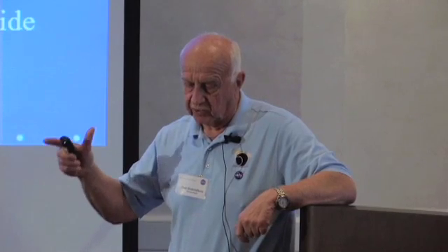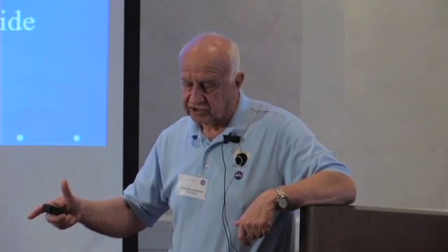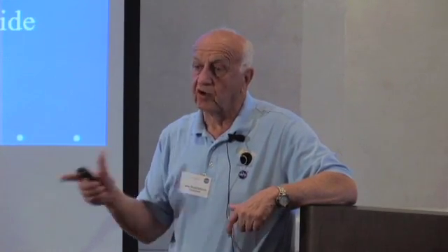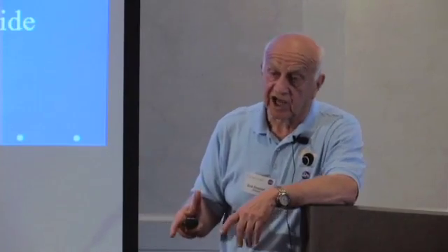And when that list was attacked, it was developed by the engineering people with good cost figures, and when we decided to implement, we then gave them 1 week to come back and say, what's the fallout of that decision in terms of what other collateral activities could take place.